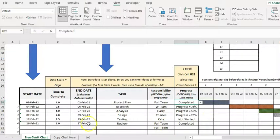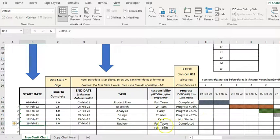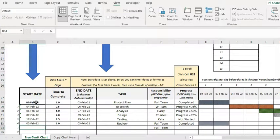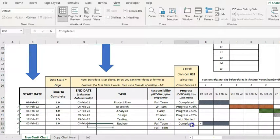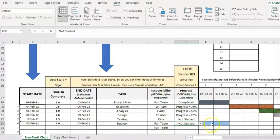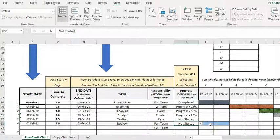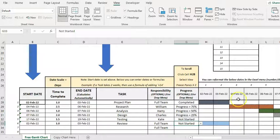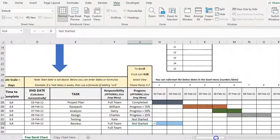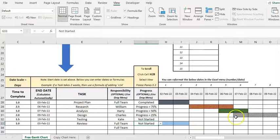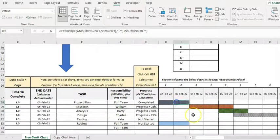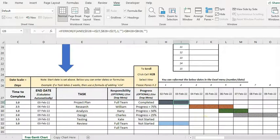So the full team here, if I bring this one to equal that and then make that not started, you can see the blue is still there. So each individual can check their colors and check when they've got something due, and then you can have a look at the degree of shading. If I come over here from 25 percent, 50, 75 percent, 100. So you can see how far we are progressed.